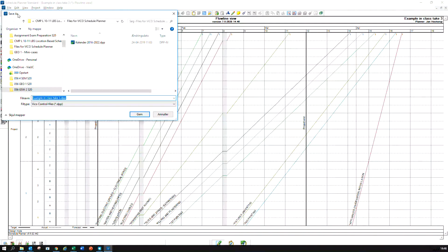If not, for example, for the bathrooms, you have a task of finding out maybe you need 2 teams working on bathrooms instead of just one. Because most bathrooms are not very big. That means the answer is not just to put more people into the same bathroom. They cannot work effectively. Maybe you need to introduce 2 teams, and Schedule Planner can handle more teams on the same activity. Well, I trust for you to find that out for the next week.